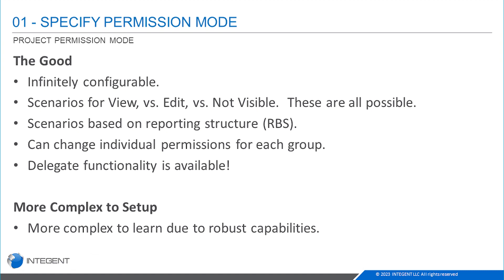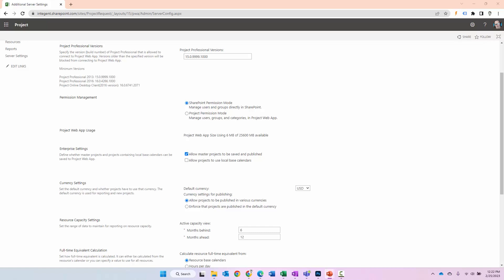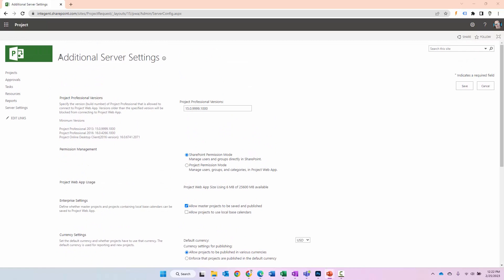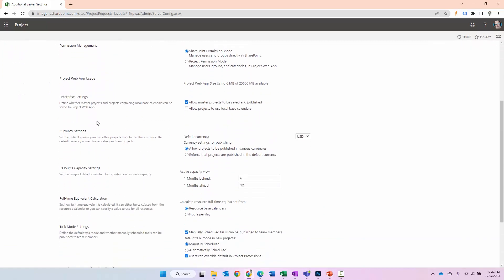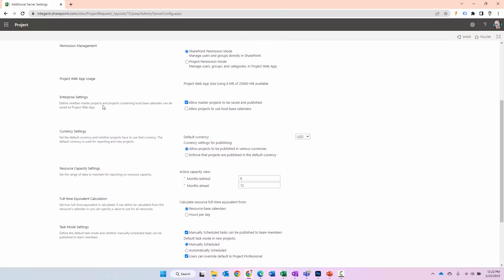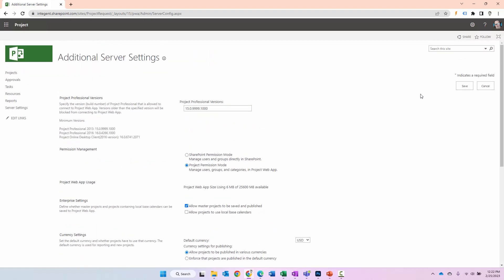So how do you switch the modes? Well pretty simple stuff. You can see that I am in additional service settings right here right now. And all I have to do here is change the permission management from SharePoint permission mode to project permission mode, or if I'm in project I switch the radio button from project to SharePoint. When I do that I click save and that will go ahead and change the permission mode in the system. And that's pretty simple stuff.